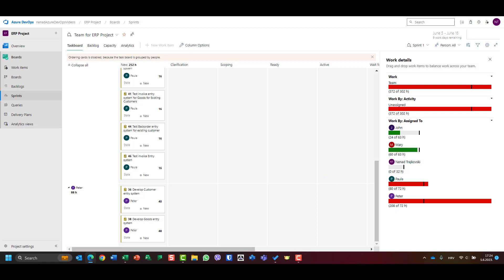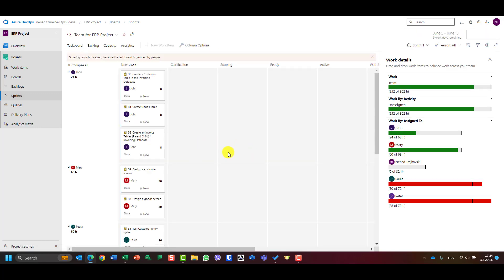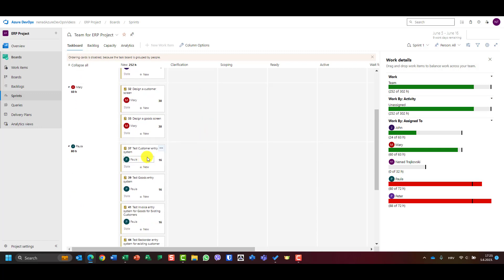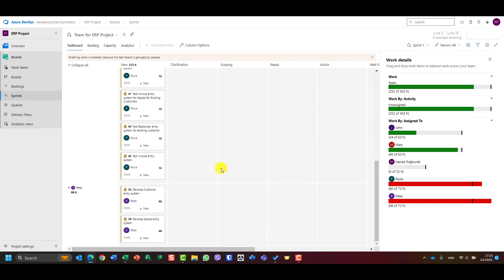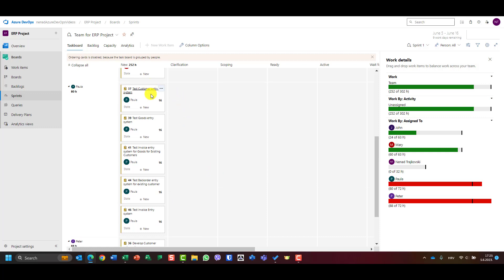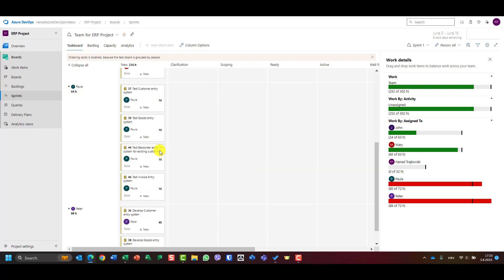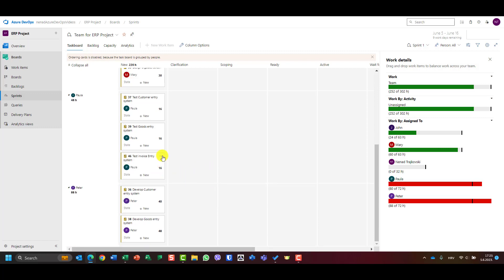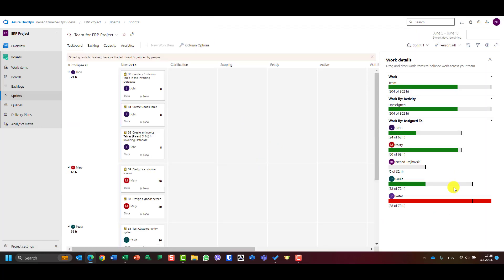Let's refresh the screen. Now Peter is over-allocated by 16 hours. Let's take a minute and look at Paula. Paula can test customer entry system and goods entry, but invoice entry system won't be developed by Peter, so she can't test that. Nor backorder entry system, nor invoice system. Let me refresh. Now you'll see that Paula is available 40 hours.